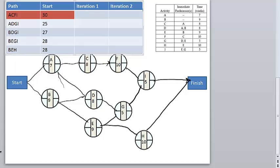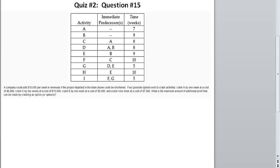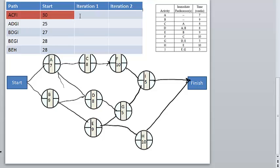So if you look back at crashing, the first thing you have to do is see on the critical path ACFI if any of these nodes are ones you can crash. You could crash A by one week at a cost of $6,000, C at $7,500, and I one week at $7,000. The cheapest to crash on the critical path ACFI is crash A by one week at a cost of $6,000. So this path becomes 29, and this one becomes 24. The other paths are not affected because A is not in those paths.